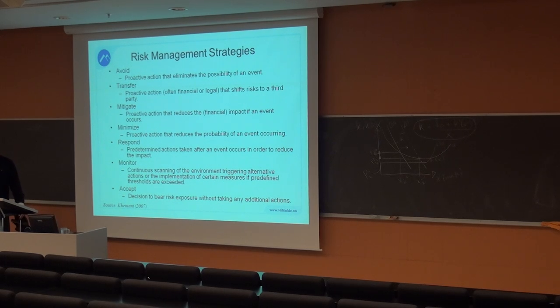I was thinking about insurance. When you spend money on an insurance premium, you actually shift risk to a third party. So when you are insuring against a car crash or something, you pay a certain amount of money, and if something happens, you have the insurance company as a third party. And they again hedge against risk by ensuring their funding in other ways, so they spread the risk through many layers or tiers. We don't have to go into their insurance business, but that is one way. But I agree that outsourcing can shift risk between parties here.